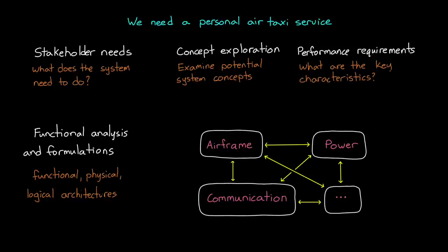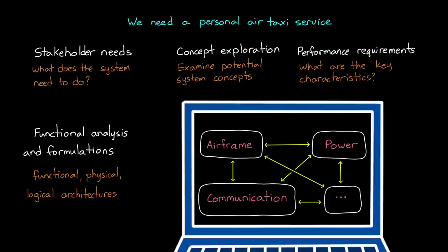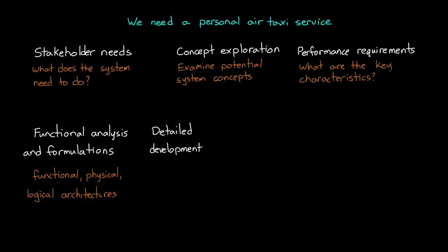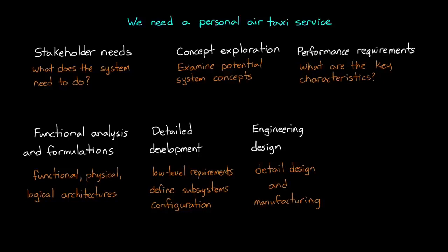We now continue to validate that the concept will meet the needs of the stakeholder through analysis and simulations. We perform more trade studies where we look at the cost and performance of different specific implementations and functional organizations of the concept. If it's looking promising, we start developing the concept into something more concrete. We derive lower-level requirements, and we define subsystems and start preliminary configuration. And we refine the architecture descriptions. And we continue to spiral through these tasks, providing finer and finer detail until we get to the point where we have enough confidence to begin detailed design and manufacturing.